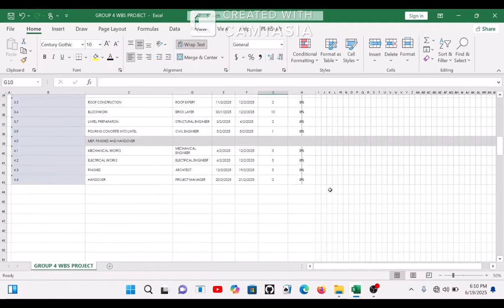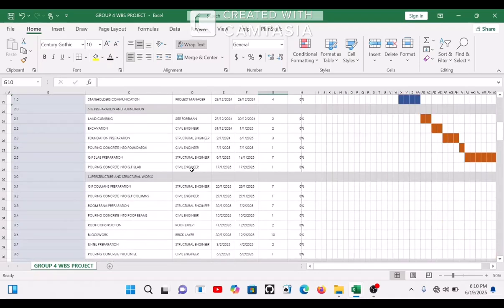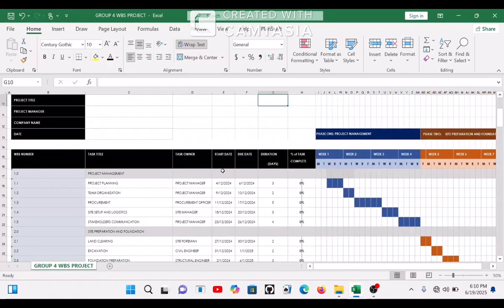This will show you who is in charge of each work item, the time required to complete it, and how far they've gone, the percentage completed. And you can also use this in preparing your site report, whether a weekly or monthly progress report, and it must be done in a table. And don't worry, we'll cover all of this in future episodes.